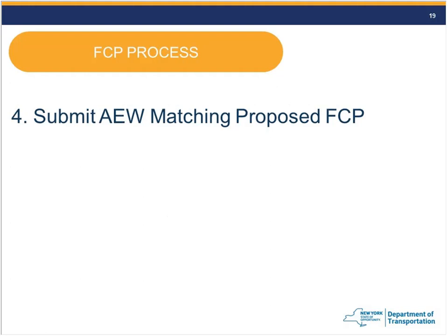Let me see here. Let's scroll back up. What does FCP stand for? Field change payment. I've got a couple of questions asking, once you exhaust the field change payment item, is it replenishable? And the answer is no. Once it's exhausted, that's it. Your field change payments are over and done with, and you will be doing conventional change orders from then on.